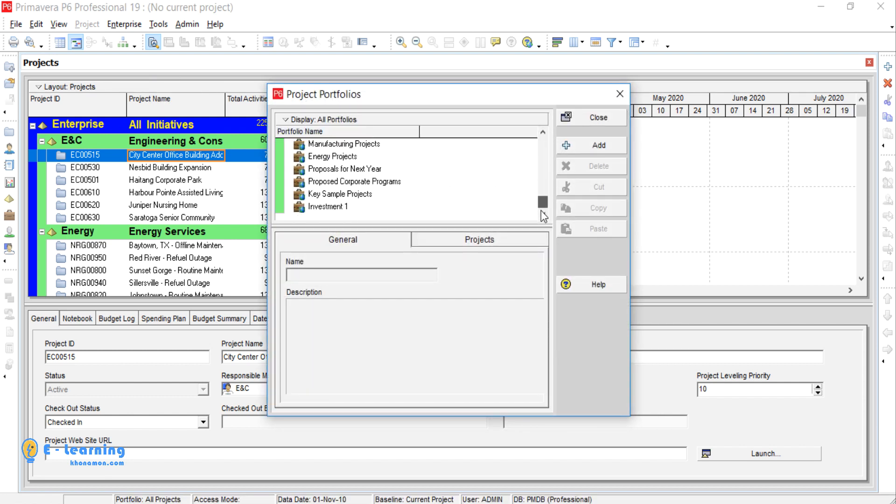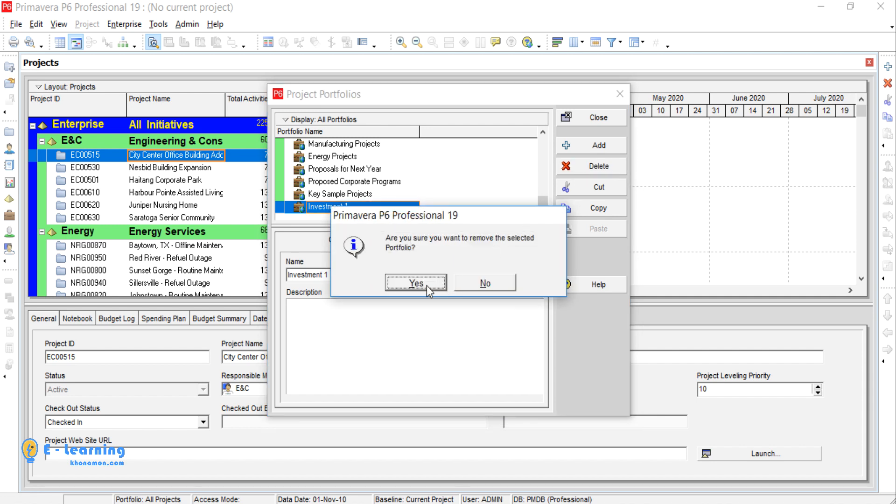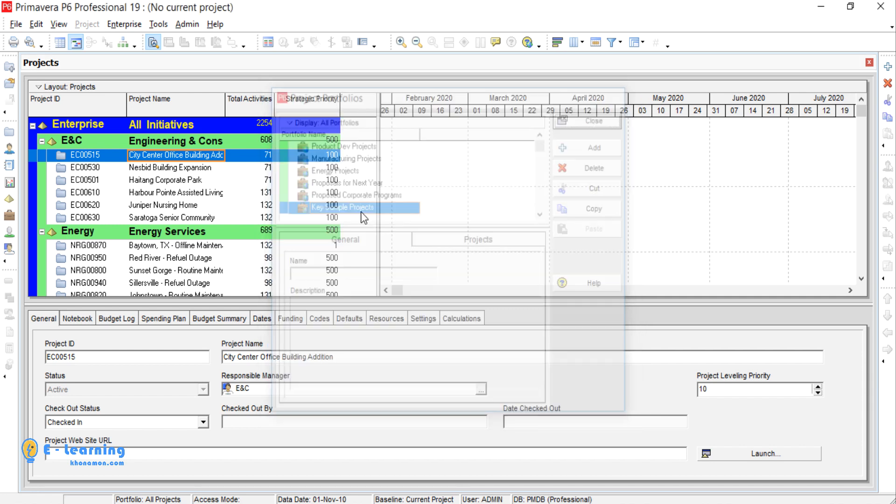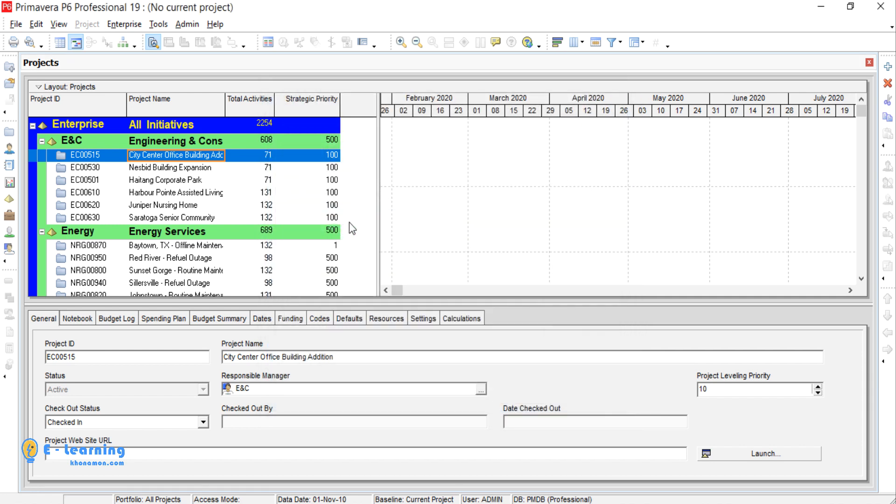For removing any portfolio, go to Enterprise, Project Portfolios. Select the portfolio which you want to remove, Delete, and press Yes. So Investment One portfolio is completely deleted.